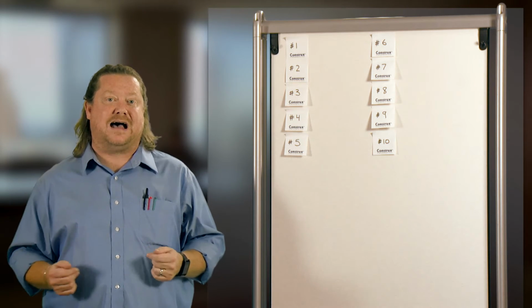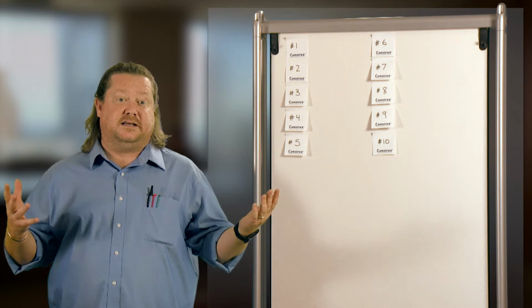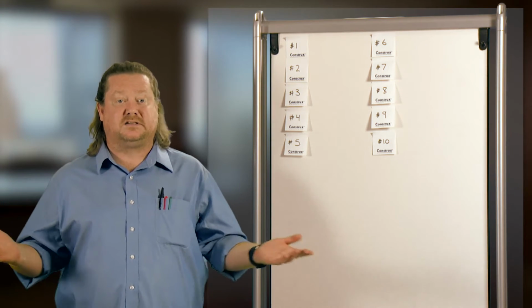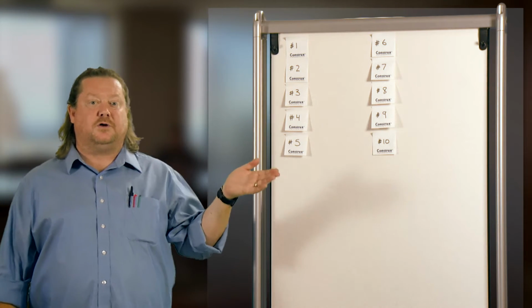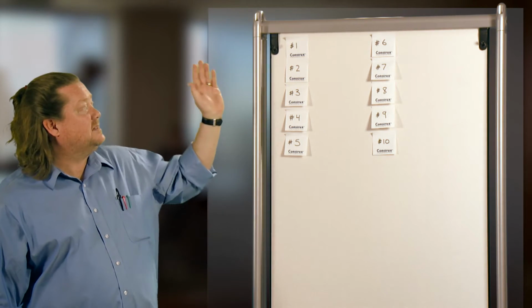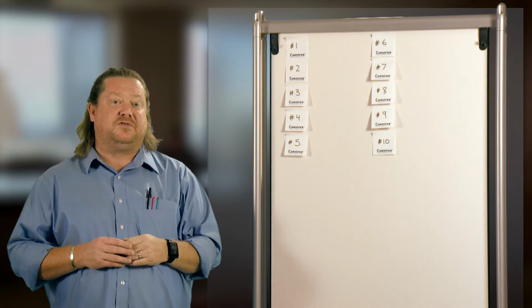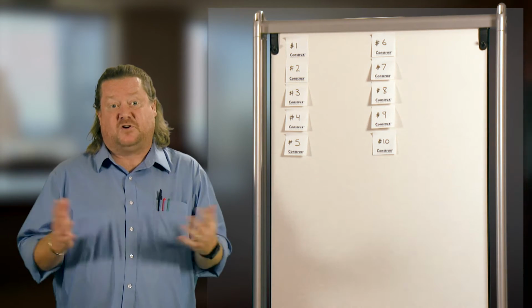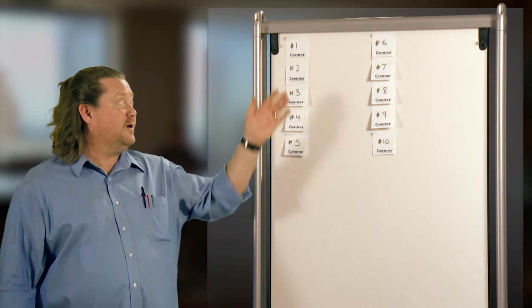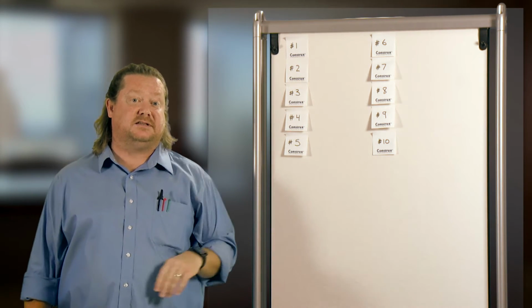So what you do is you have every individual in the team come up with their ideas. You write each idea, just like a user story, on a sticky note, and you put it up on the wall, you put it up on a whiteboard just like this. In this case, we have 10 items. Once you've gone through the process where you've figured out what the team wants to do, for example, PBIs, and you've written them down on sticky notes, one item per sticky note, you can then proceed to the dot voting process.